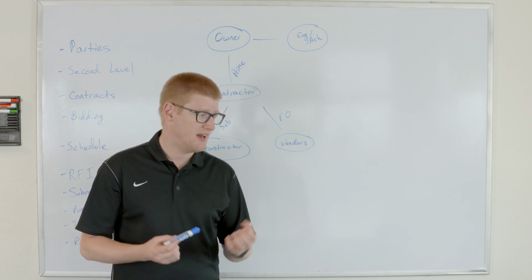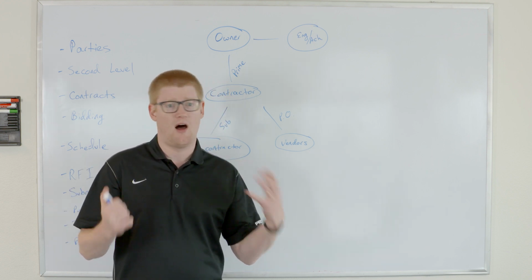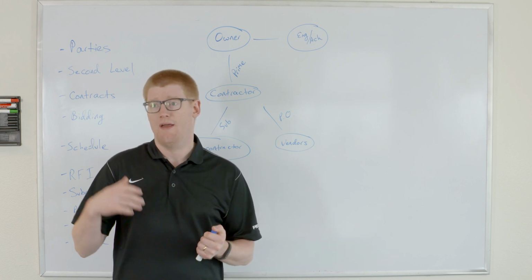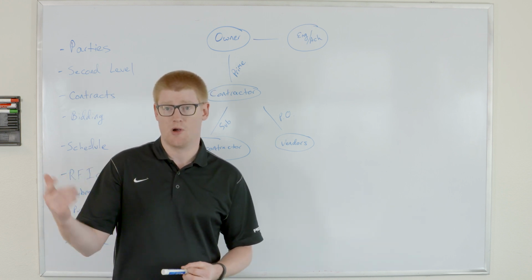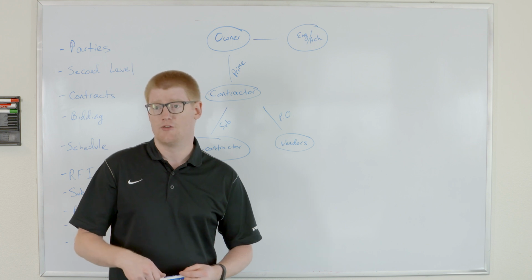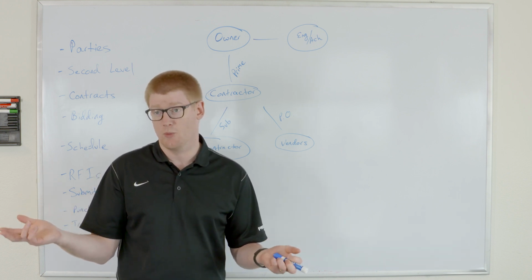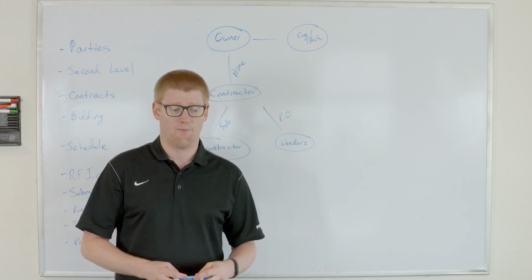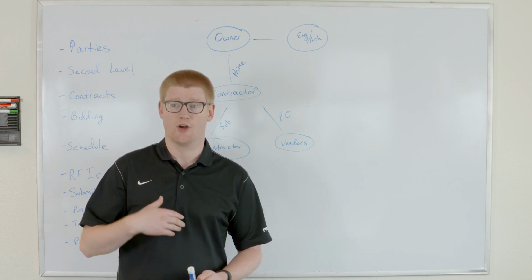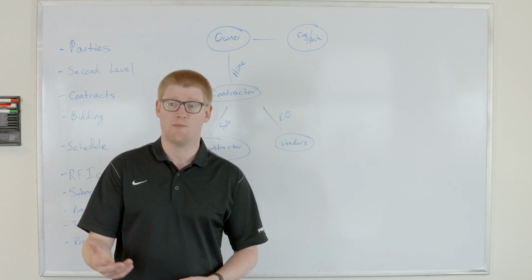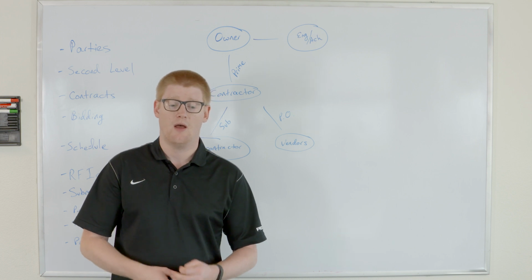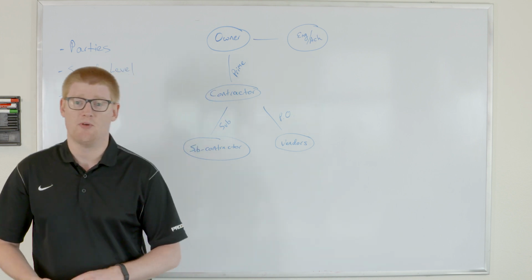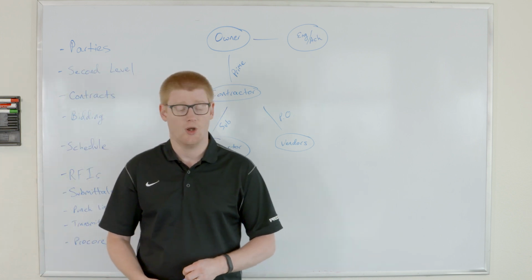One of the biggest reasons is just simply the cost of doing the work on site. So if you have a large contractor, and we're in Santa Barbara here, if we had a large contractor from, say, Los Angeles come up and do the work and build this building, that would cost them a lot of money to have their contractors, their people, their builders come up here and live here, work here, eat here. And it may be cheaper for them to just hire locals to come do the work.